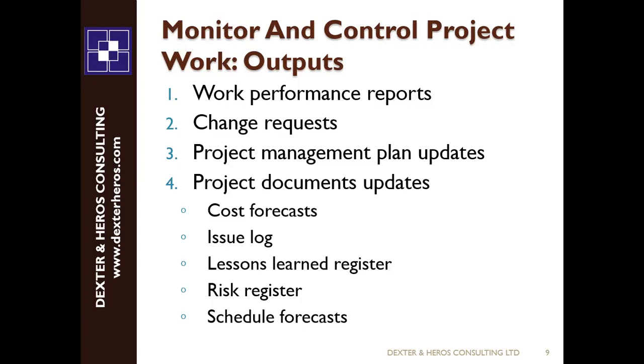But as long as it concerns the date you are going to deliver your project, or you will be requesting additional cost, or you are going to be adding additional work to the work that is on the project plan, you need to speak to the sponsor. But if it does not concern these three areas, you can go ahead and make changes in your project. So it is not every change that you go knocking on the sponsor's door to ask for.